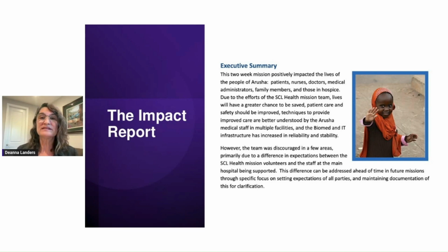But what we did is we identified the significant results of the project based on the logs and things like that they were tracking, the accomplishments, the finances versus the plan, the beneficiary satisfaction, the project team satisfactions, those things I just talked about, any other measurements that we came up with, and of course, where we could do things differently and improve, those lessons learned.